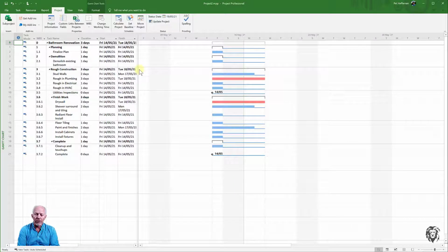If we want to use it to simplify scheduling or resource deconfliction later on, you can consider it. But try to avoid that, because really the way the program is set up, we're intended to use constraints to do scheduling nuances, whether for resources or to meet calendar needs or anything else.